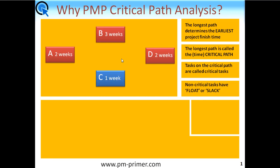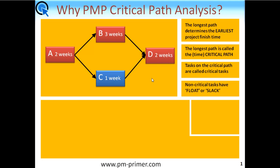Here's a very simple example of a project — just four tasks. Task A of two weeks in duration, Task B of three weeks, Task C of one week, and Task D of two weeks. Let's link them together in a very simple fashion. If I asked you to tell me what is the earliest time we can finish this project, you'd say it depends on the longest path. Since Task A has got to start and complete before we can finish, and Task D has got to start and complete before we can finish, these two by definition must be on the critical path.